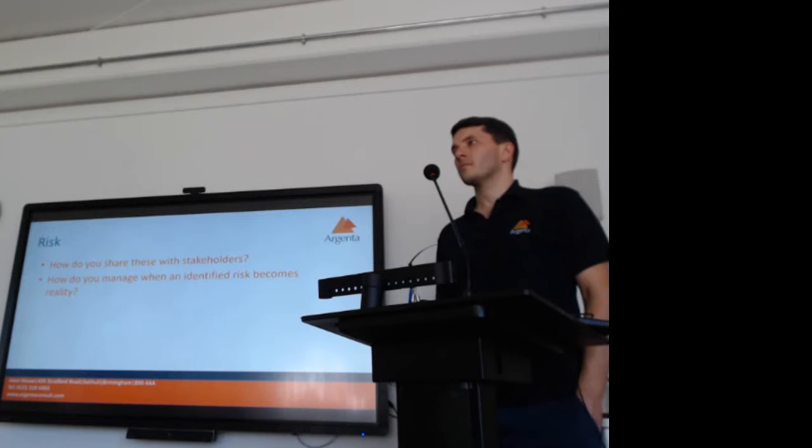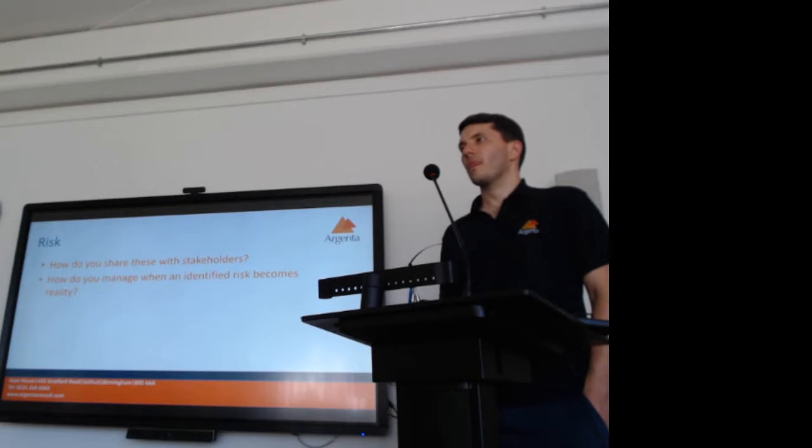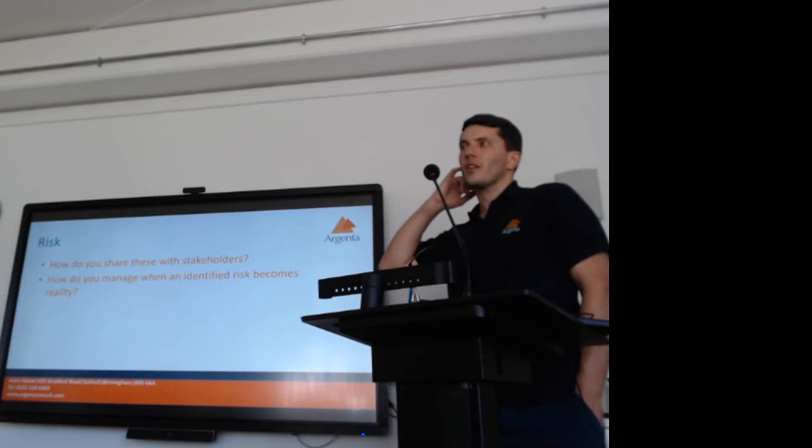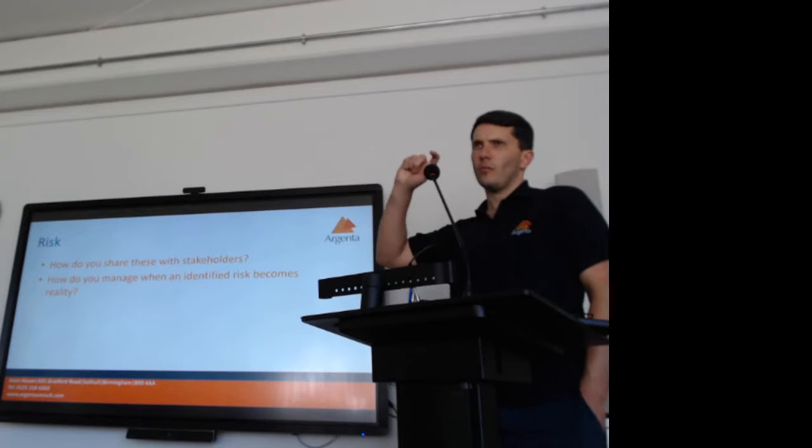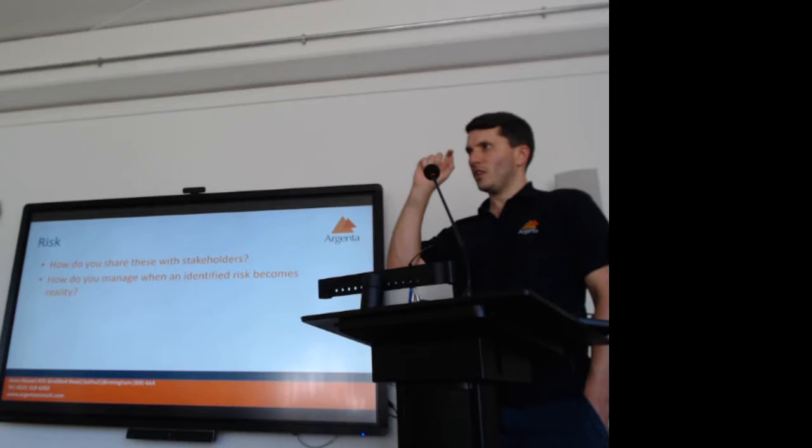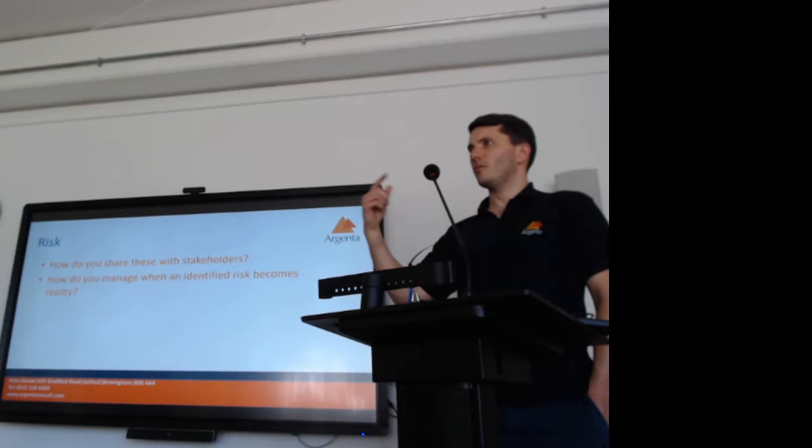And then with that customer, what we did basically was, again, different cases, we've actually split that risk out to a separate work item. And we say, this is a risky item. Before we commit to the whole project, we need to do a small work package on this first to prove the risk or not. That's a nice way of handling the commercial side of it, isn't it, I think, as well. So you can say, right, we can spend a couple of days on that, and you can then quantify it, but at the end of that you'll have a much better understanding to enable you to fix price it if that's what they want, I guess.